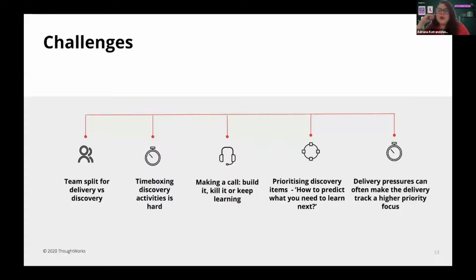And so what we did was, in one of the teams, we had a prioritization matrix that layered all of the activities that we had in discoveries and hypothesis, and whether those linked with the short, medium, or long-term goals for that organization. And so if we deemed that it linked to the short-term goals and it was high value, then that would be prioritized.